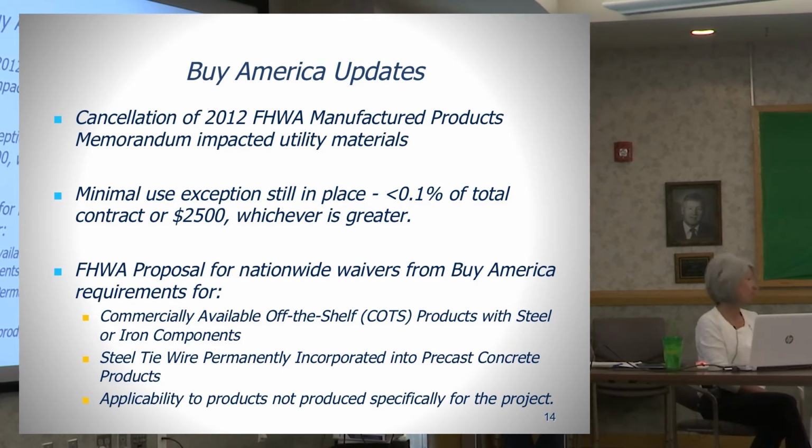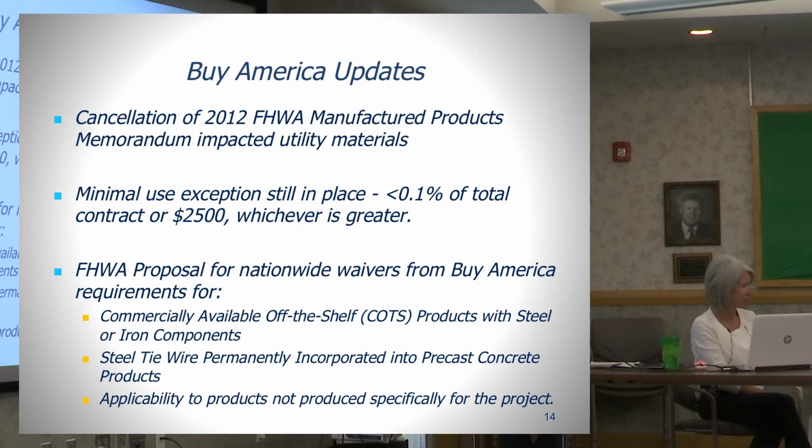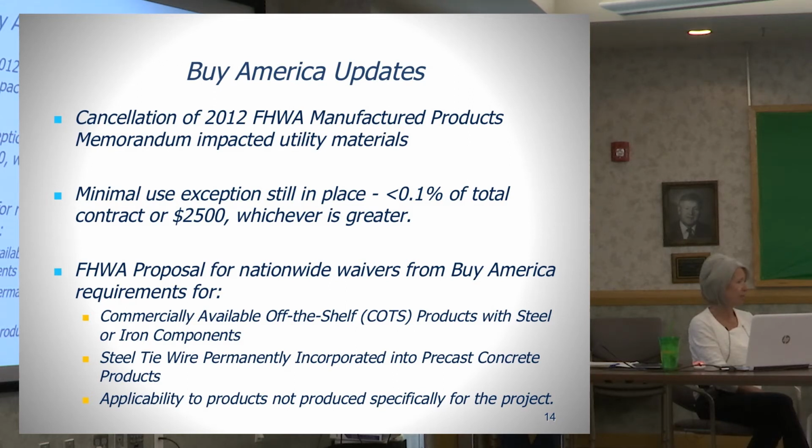Back to your question, yes, there is the ability to do project-by-project waivers, but it would only be for an individual project. I understand it's a very lengthy process, so it would be something you would have to start, I would say, not only months but years in advance of a project, if that's reasonable.